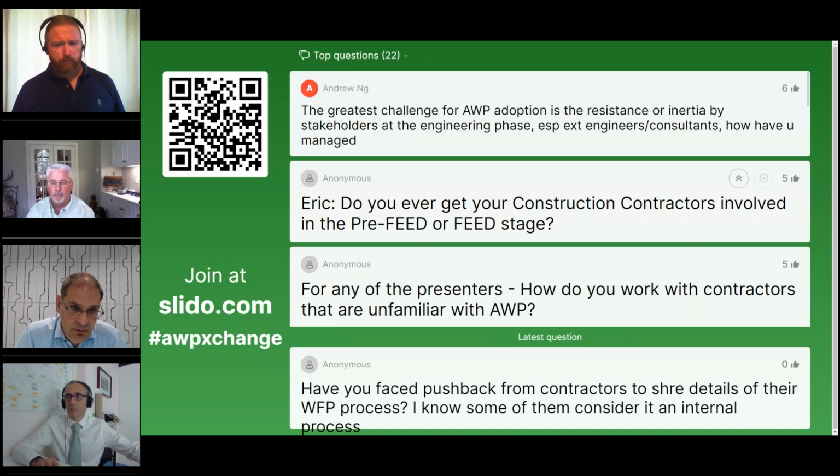So typically we will involve in the pre-feed or feed phase construction contractors regarding applying AWP and work phase planning. We conduct these workshops in this phase, but really working the path of construction, defining CWAs and so on.